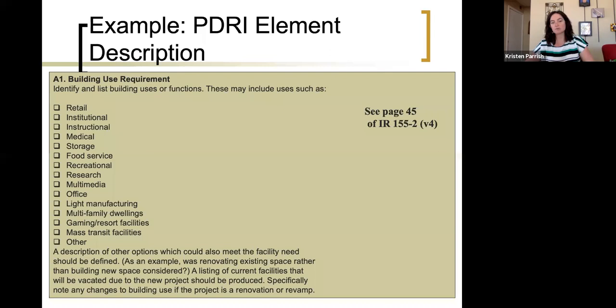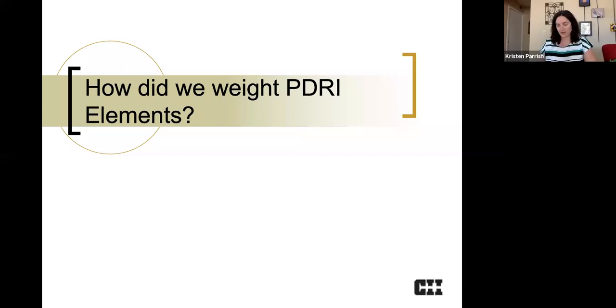And then you'll also see a description of other options, which could also mean the need should be defined. As an example, renovating your existing space rather than building new space should be considered. A listing of current facilities that will be vacated due to the new project should be produced. Specifically note any changes to building use if the project is a renovation or revamp. So the idea here would be that if you look at this and you think, okay, how clear am I about this? And that's going to result in us giving it a score or a weight.